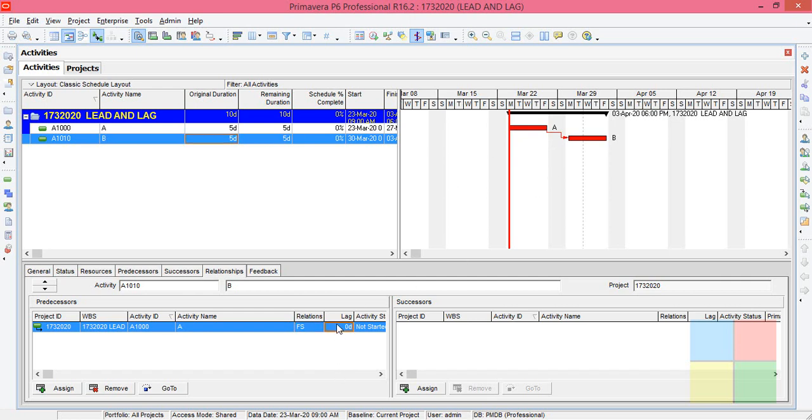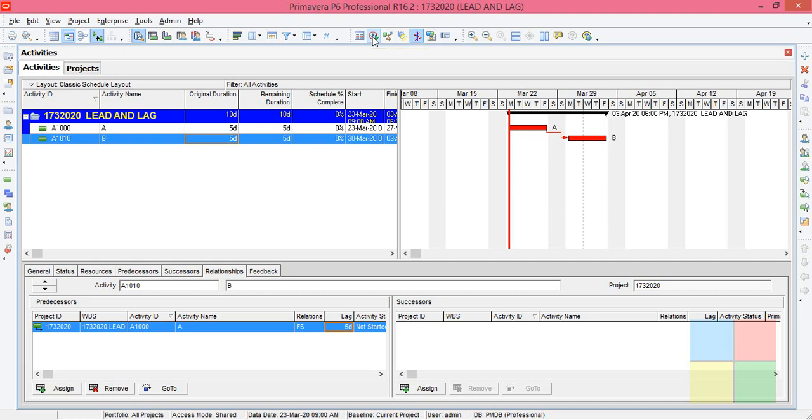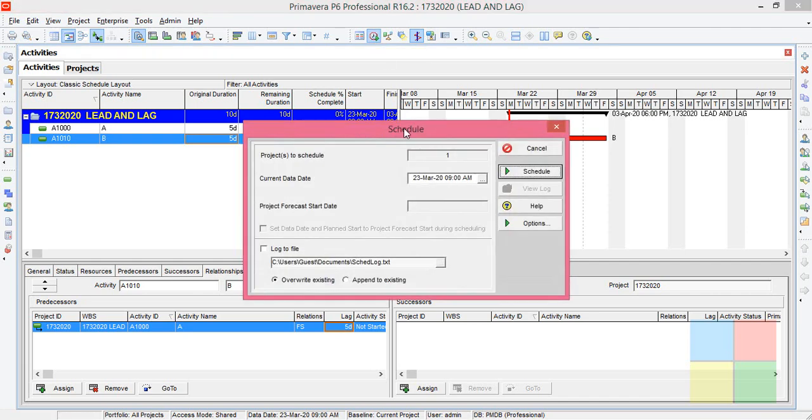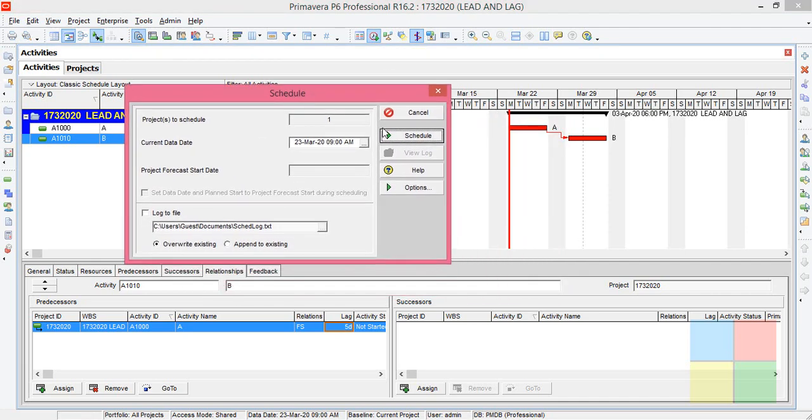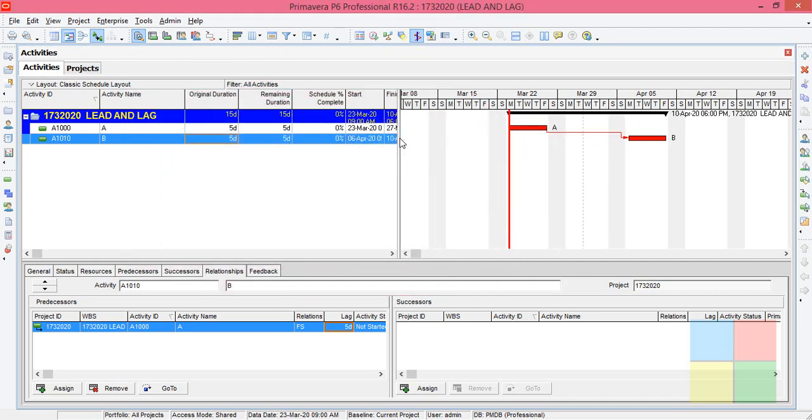Now it is zero. By default it will be zero. Let us change the value to some positive value. I'll change it to five. Enter, now see the changes. You need to update using the schedule button. Click on Schedule. See here, since I input the value as five, you can see a gap of five days here.